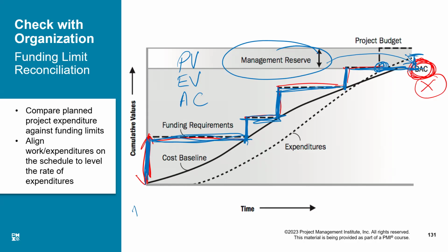The total sum of all the project activities at any point in time is PV, and for the total project would be BAC. So the highest point of PV is called BAC. But by these three items, I can always calculate how far behind I am in schedule or in spending.